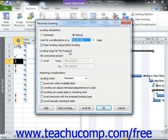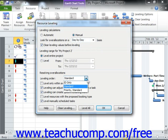You next choose the guidelines to use for leveling from the choices shown in the Resolving Over Allocation section of the Resource Leveling dialog box. For most projects, ensure that the standard choice is selected from the Leveling Order dropdown. This resource leveling method respects the task relationships between the tasks in your project file and is therefore the most commonly used.